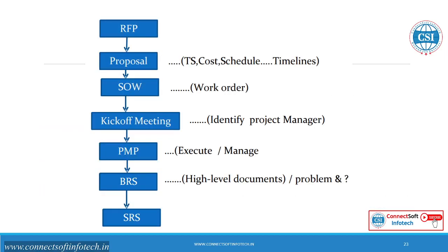Once we get the requirement, the client gives an RFP, a request for proposal, to the software company. The vendors give a response with their proposal containing the technical solution, cost, schedule and timelines. Once the client agrees with this proposal, we sign off the work order to confirm the agreement. That is the statement of work, a work order.